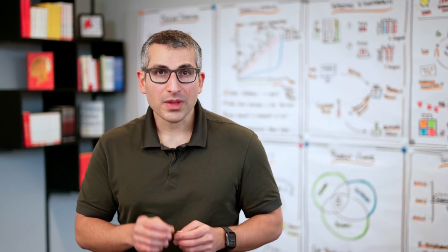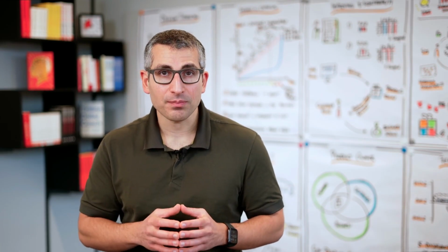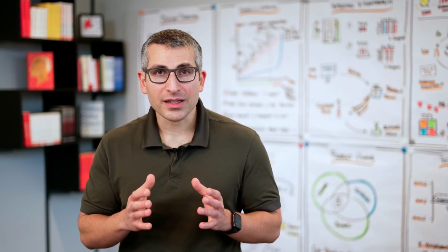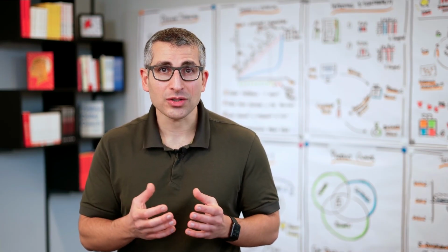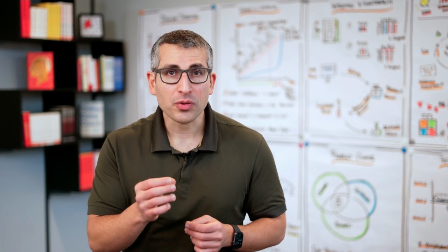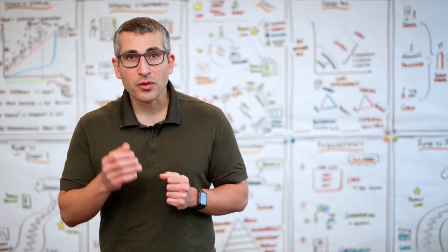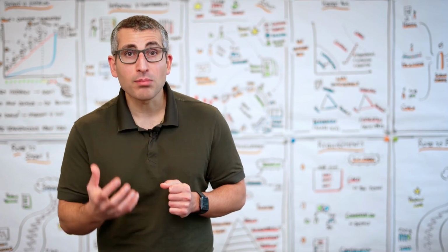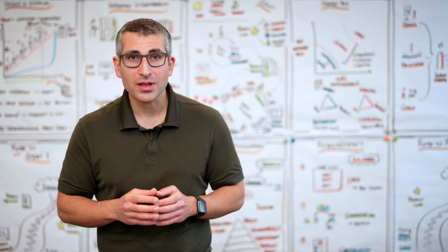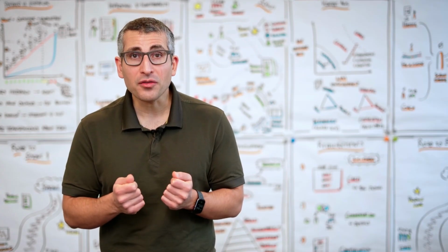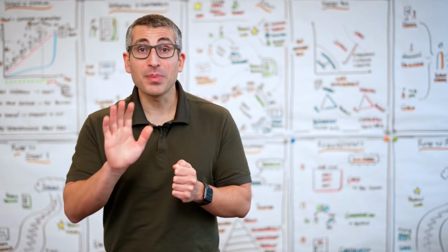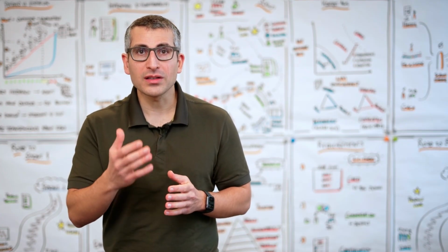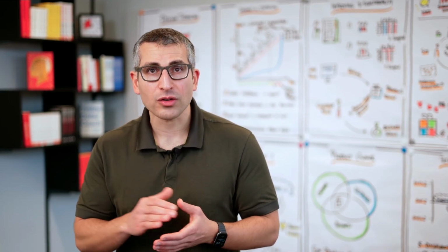You probably remember that a Scrum Master also protects the team. And a Scrum Master does not only protect the team from stakeholders, but in many cases, especially when the team has not reached a certain level of maturity yet, from the product owner itself. So when a product owner, for example in sprint planning, demands more and more and more from the developers, and they are not self-confident enough to say stop and actually pull items in instead of them being pushed in, a Scrum Master would intervene.